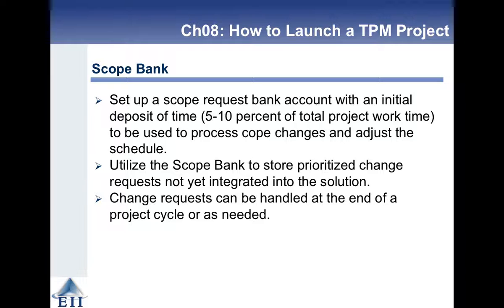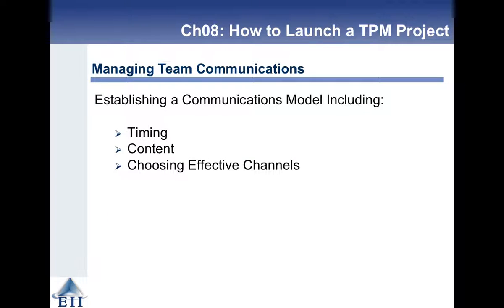If you're completely committed on all your resources with the currently known state of the project outcome, then you're not going to be able to cope with anything. So you need to have that overhead, that scope bank, to be able to make a withdrawal, to be able to do that extra stuff.